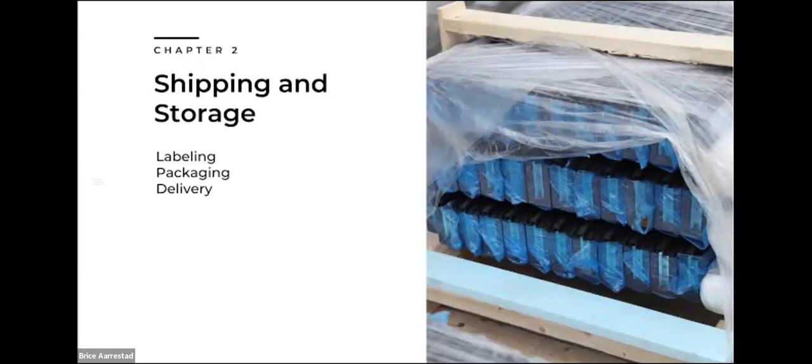We've had glazing contractors who said, compared to traditional aluminum systems, these timber curtain walls, since there is so much pre-manufactured and everything is really going together like a kit of parts, it can save up to 25% on field labor.